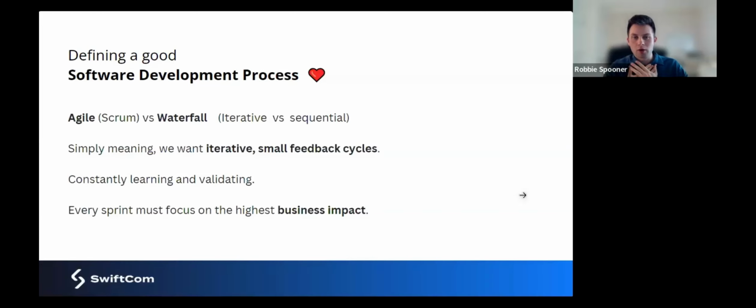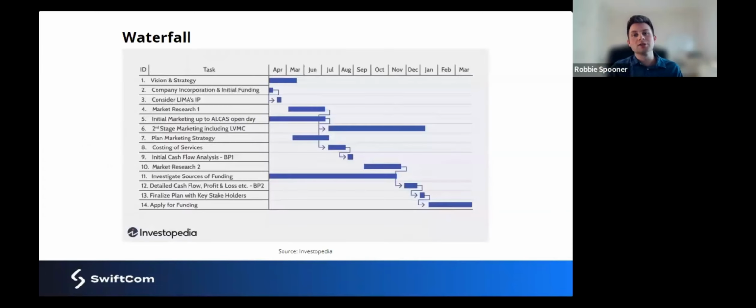Practically, we work with most of our clients in 2-week sprints. So 10 business days. We have daily 15-minute stand-ups with a multidisciplinary team. So there's super high communication, extremely high visibility. Daily progress is being made that's clear to see. And that's just fundamentally different to Waterfall. But I hope you could see that it's that type of structure that is maybe more likely to lead to success. To give you a visual example, here's Waterfall.